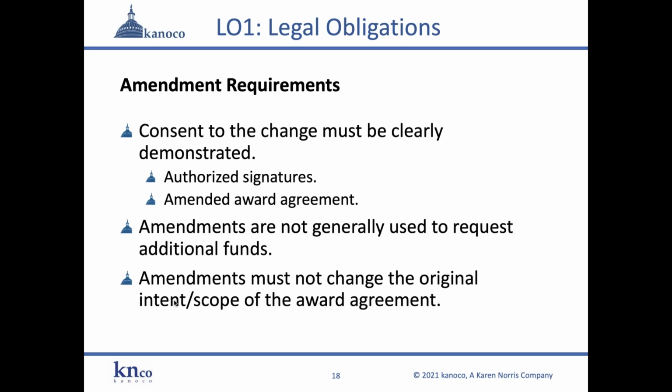It's sometimes forgotten. Amendments are not generally used to request additional funds. They can be used, but it's very rare. They are not generally used to request additional funds. There are other kinds of changes that have to do with program implementation that have to occur. Amendments also must not change the original intent or the original scope of the agreement.